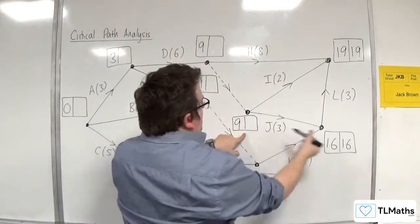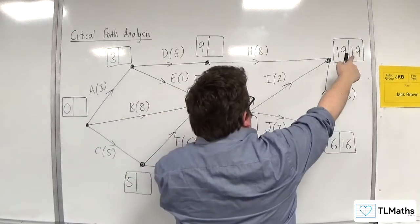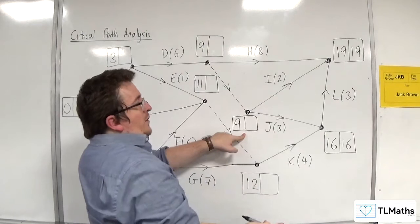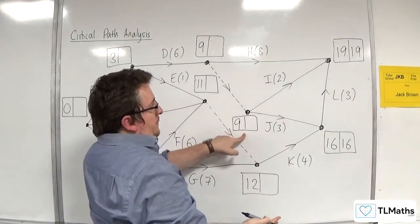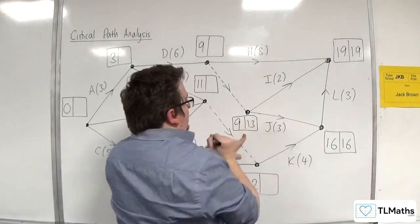So we've got, for this one, 16 take away 3, so 13, or 19 take away 2, which is 17. So you're always going to take the smaller of these ones. So 17 or 13, so 13 wins it.